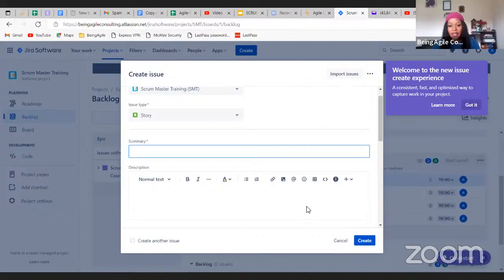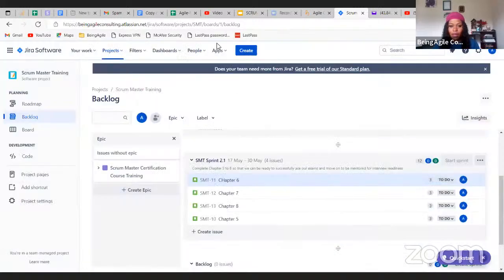And then the other one is emergent. So this product backlog, have you emerged the product backlog? I'm asking the PO also, is it emerged already? And then the PO may be like, what do you mean by that? And then I'll say, okay, have you updated this backlog based on the feedback from our previous sprints? And then with that guide, if the PO has not done it, they will know they have to do it. That's really how I do it.